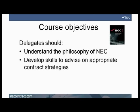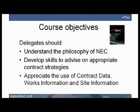You should be able to develop skills to advise on appropriate contract strategies — when to use option A, when to use option C, and so on. You should appreciate the use of contract data, works information and site information — new terms to get your heads around in the context of putting together tender documents.